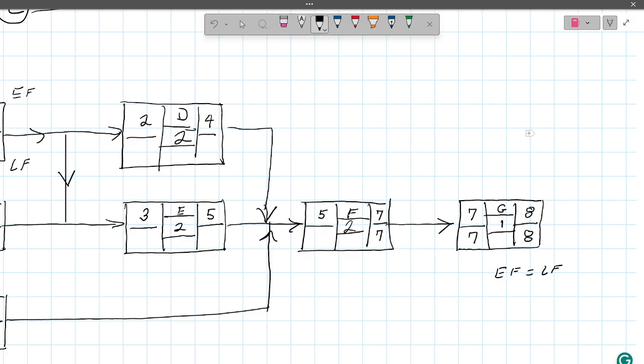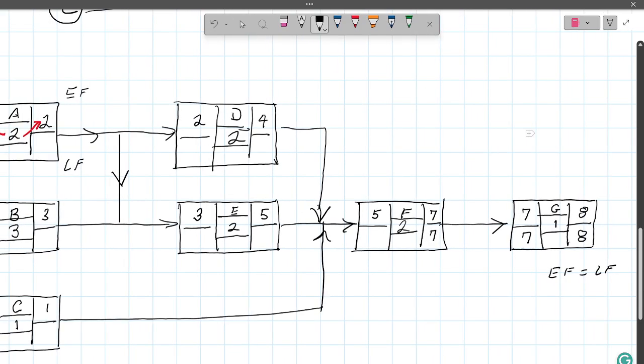No. If you declare the finish early is April 12th, then your latest you can finish is April 12th. Okay? And that's going to be written in a contract. You're going to start on this date, you're going to end on this date. And that's how you're going to do it. With me so far? Okay. All right. So 7 minus 2, well, that's still a 5. So that's kind of a critical path right there.